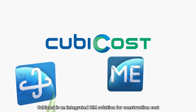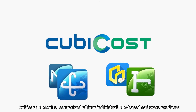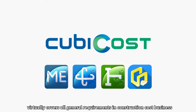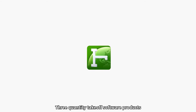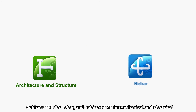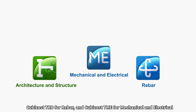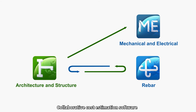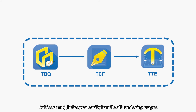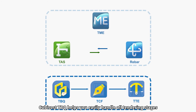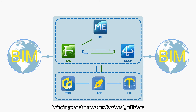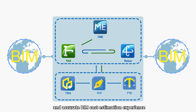Qubicost is an integrated BIM solution for construction cost. The Qubicost BIM Suite, comprised of four individual BIM-based software products, virtually covers all general requirements in construction cost business. Three quantity takeoff software products — including Qubicost TAS for architecture and structure, Qubicost TRB for rebar, and Qubicost TME for mechanical and electrical — help you deal with all kinds of calculations with BIM technology. Collaborative cost estimation software Qubicost TBQ helps you easily handle all tendering stages. BIM models and related data can be easily transferred among the four products, bringing the most professional, efficient, and accurate BIM cost estimation experience.